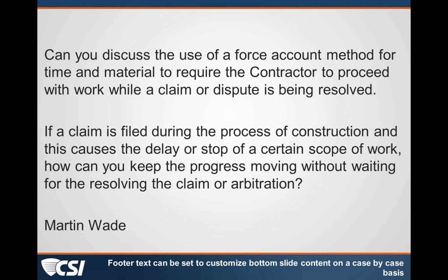AIA 201 Section 8.2.3 reads, the contractor shall proceed expeditiously with adequate forces and shall achieve substantial completion within the contract time. So that's kind of contemplating that once you start contracting, you're going to keep working until you get to substantial completion. And then Section 8.3.1 of the AIA 201 General Conditions says, if delay is valid, then the contractor is entitled to a time extension. So if the contractor is delayed by delay authorized by the owner or pending mediation or arbitration, the contract time shall be extended by a change order.